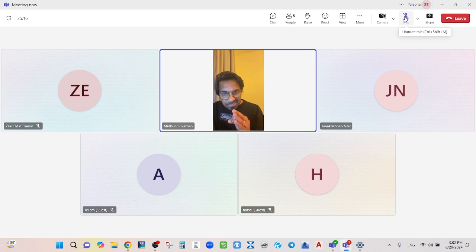Second case, this 10% will be sufficient for an employer to find a new contractor. If you are not performing, definitely the employer will terminate you. When you terminate the work, you have to find a new contractor. So when you encash this bond, they will get this money in hand. That money usually will be sufficient to find a new contractor and appoint them in normal cases.